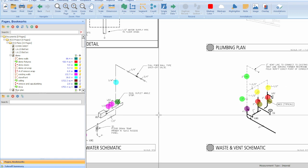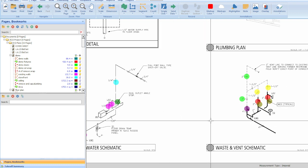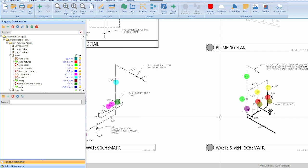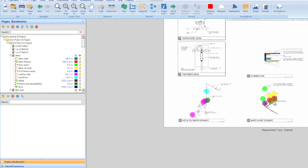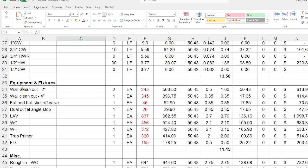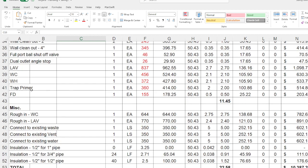So I don't really like going from the floor plan because it may not show all of the floor drains and wall clean outs and stuff clearly on the floor plan. So I like counting my equipment on, I'm mixing up HVAC too because I just finished an HVAC. So yeah, I like counting all of my fixtures for my plumbing using the riser diagrams because it's clearly there. The whole system is there. You just have to make sure that certain things that, for instance, if you have like a grease interceptor, that's not going to be shown on your water plan, on your water riser. It's only going to be shown because that's specific to a sewer plan. And things like maybe your water heater won't show on your sewer plan, but it'll only show on your water plan. It really depends sometimes. So that's why you really have to pay close attention to plumbing fixtures that are specific to only that plan.